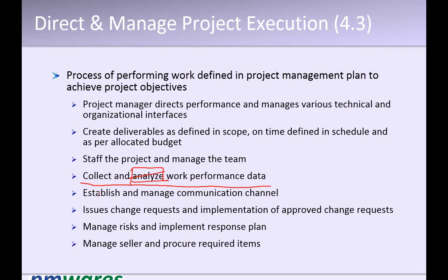Right. So you have a plan for design. Now you are designing, that is, you are executing the plan for design, and then collecting the data on how it is happening, and doing reviews of those things while the design is happening. Doing review at that time is a part of execution. When design is complete and then you are reviewing it, then it becomes a controlling part.